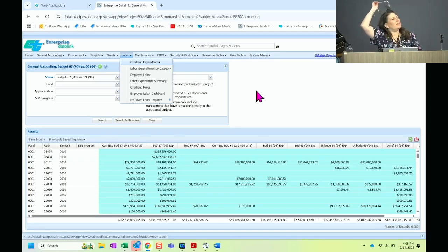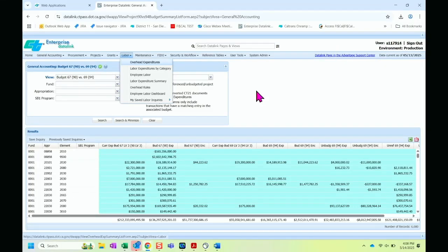Transportation revolving fund, yeah. So it's basically all state funds. It's all state money. 0048, there's like this account. It's like a bank account that accounting has. And so everything hits that first until it goes through the funding profile. And then it reduces the 0048 and goes to the ultimate fund. That's how it's supposed to work if we don't type it wrong. Does that help? Okay.